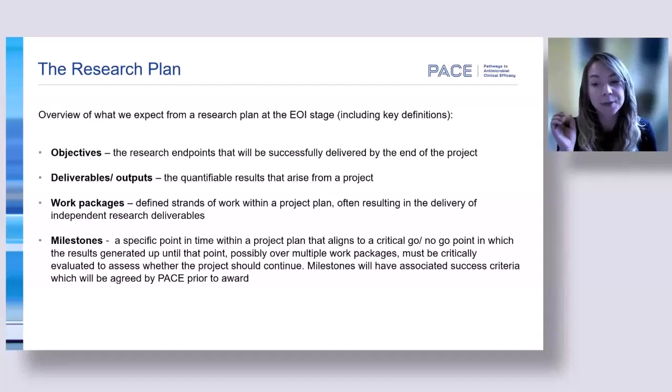And the milestones, they're really the key tools to help you measure success along the way. They should align to your target product profile, and they're critical go, no-go points at which you will decide whether to continue with the project or not. And they can incorporate results from multiple work packages. So we will have to agree on the milestones prior to award, and we'll be working with you in the second stage to work on those.